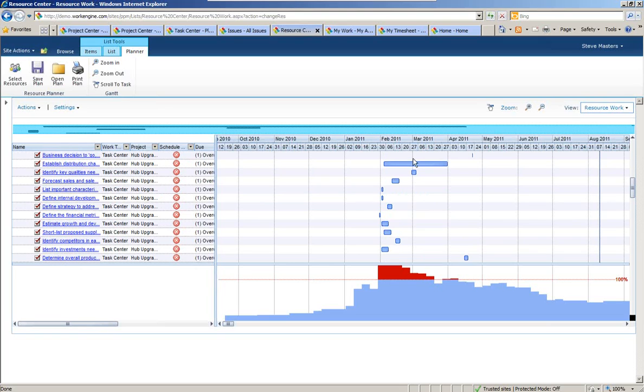If I took a piece of work, I can do this in a what-if mode here without impacting the overall committed plan and start exploring the ideas of what if I could backfill certain work, or more likely at times you're moving out work into different places. And the idea is we can look at that from a resource work perspective and look at whether or not we can find a time slot for Bob to do that work, or maybe we have to reassign it to someone else.